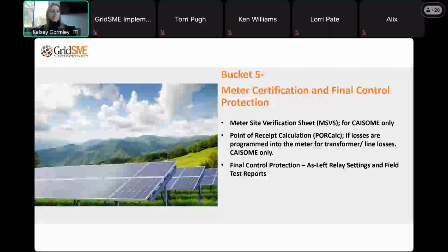The other lesson learned is on the owner's side of this. We shouldn't be putting the CEO of your company as the signatory on these forms. It should be a representative of the owner's project management team who is aware of and paying attention to this submittal. It seems silly, it seems like overkill, but really it's the kind of thing that can make or break a project timeline. If we have 4 folks that we're counting on to get this submittal completed, and we end up waiting on one person who didn't even know that they were responsible for this. So just another lesson learned that I think is important to share as we move through this.